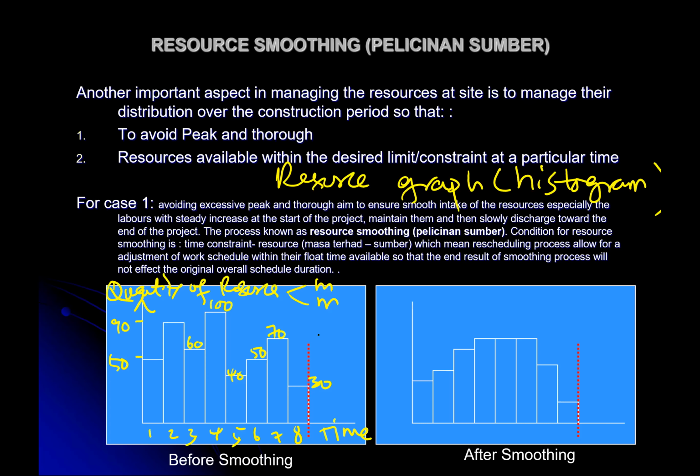So you start the project with 50. Okay, 50 is fine. Then suddenly it increases to 90. Maybe it is still okay for the first and second month. And then for the third month, just imagine from 90 to 60. So 30 people are missing here. Where do you want to put the rest of the 30 people? You must remember, construction workers are paid based on the work. If there is work, then there is payment.